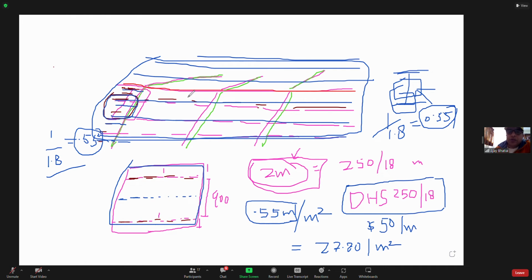You are not doing the spacing over here, how many purlins would be there. This is like 4 meters; you divide it by 1.8 and plus 1. We are not doing that. We are doing what is the possibility and the length of the purlin which is happening in 1 square meter. They are two different things. Is this understood? Or still confusion?